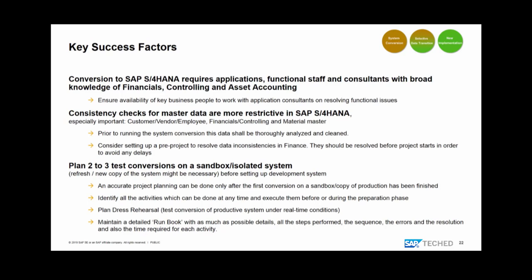For system conversion, doing minimal scope for the technical uplift requires the inclusion of functional expertise — either have it on board or bring in application consultants. Test conversions are critically important — not only doing the technical conversion part with the Software Update Manager and optimizing downtime, but going through the whole process including application-related preparation steps and post-upgrade steps. Involve business people in these test conversions, create runbooks and scripting about the procedures, refine them iteratively, and you'll get a very forecastable productive system conversion.